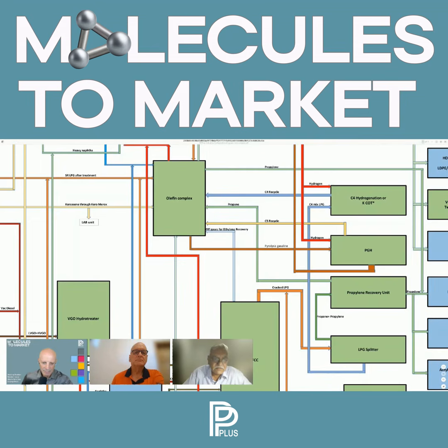That process prior to the configuration, which we did not discuss over here, is the process of screening study in which we have a whole lot of options. We develop some macro options, and from there we start screening, come to 2 or 3 options, and finally boil down to a configuration based on a scientific process of carrying out a prima facie techno-economic study.